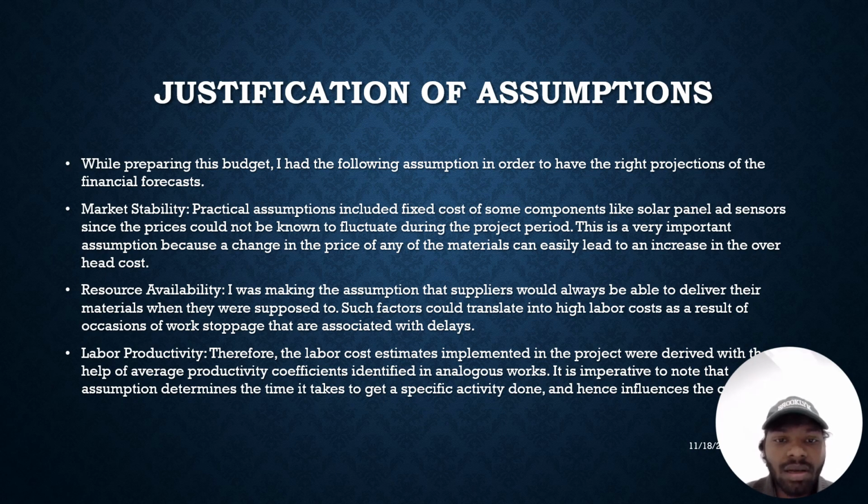Justification of assumptions. While preparing this budget, I had the following assumptions in order to have high-quality projections of the financial forecast. Market stability: the practical assumption included fixed cost of some components like solar panels and sensors, since the price was not expected to fluctuate during the project period.